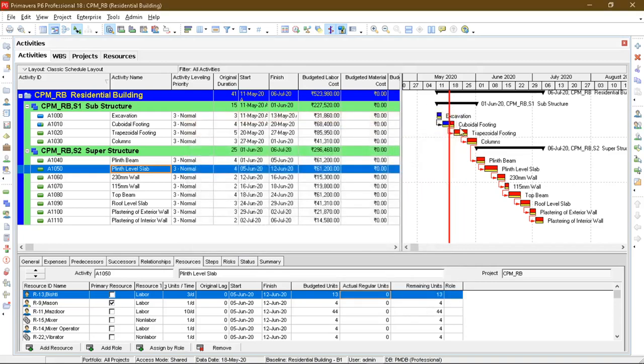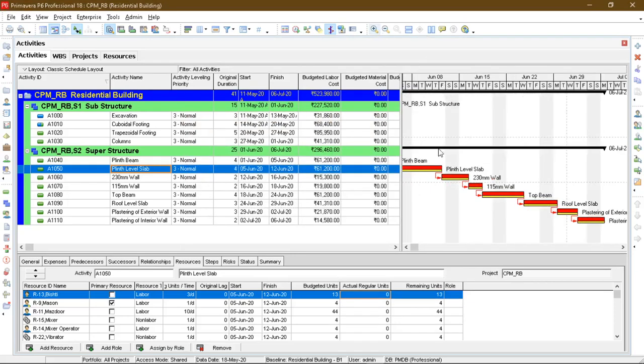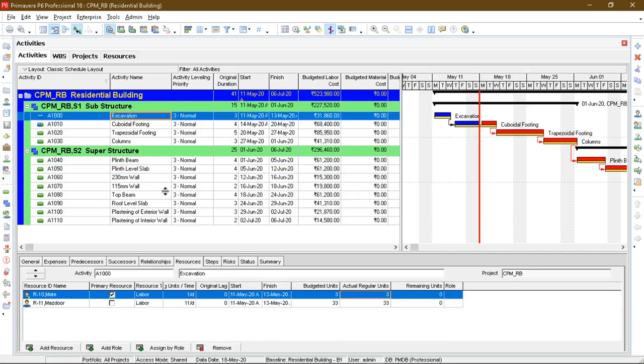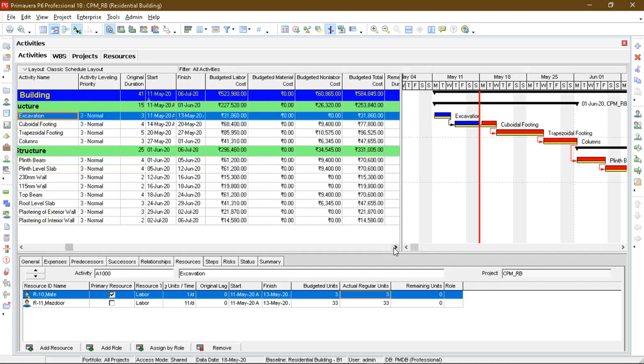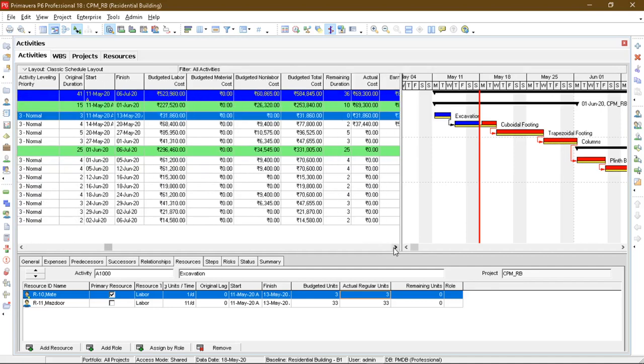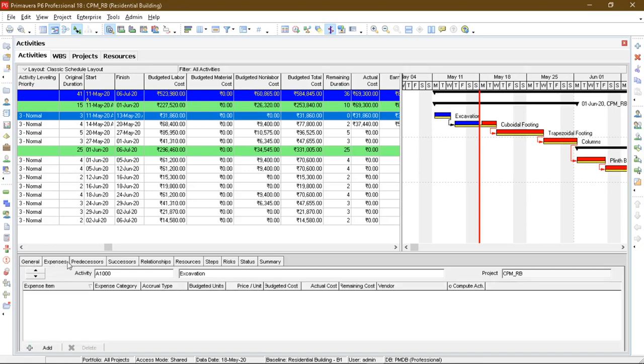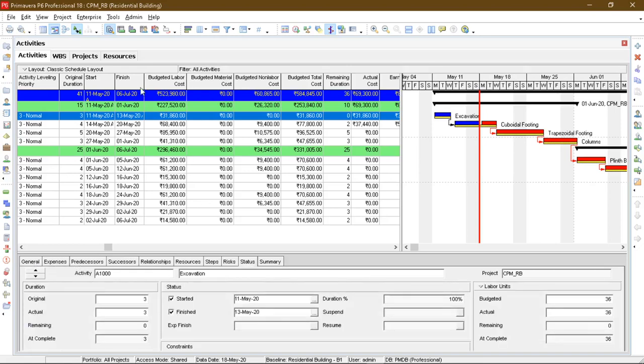As you can see, after updating, initially my initial day was 11th of May 2020. And after updating, I have updated after the sixth day. So you can see this is after updating. These are the activities which have been completed. As you can see the excavation part is completed. In the general tab, status tab, as you can see.